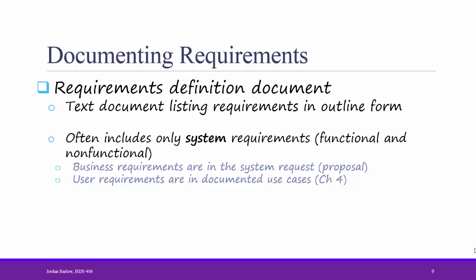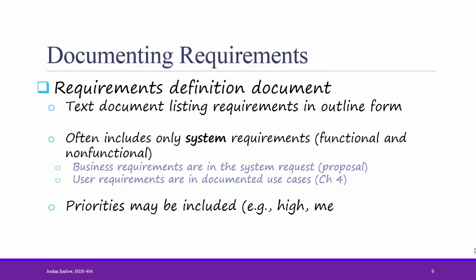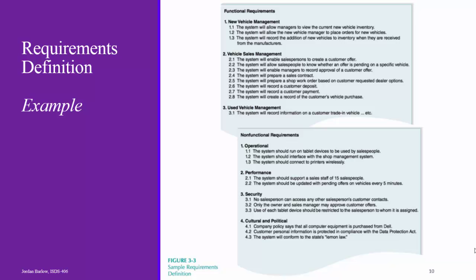The Requirements Definition Document can also include priorities. Here's an example of a Requirements Definition Statement. As you can see, it's organized in outline form and split into several subsections to make it easier to read. The Requirements Definition is a required part of your semester project deliverable in this class. This is on page 90 in the 6th edition and page 110 in the 5th edition. Essentially, the Requirements Definition Document determines the scope of our project. Remember when we talked about scope creep last week? This is the document that we can use to make sure scope creep doesn't happen.